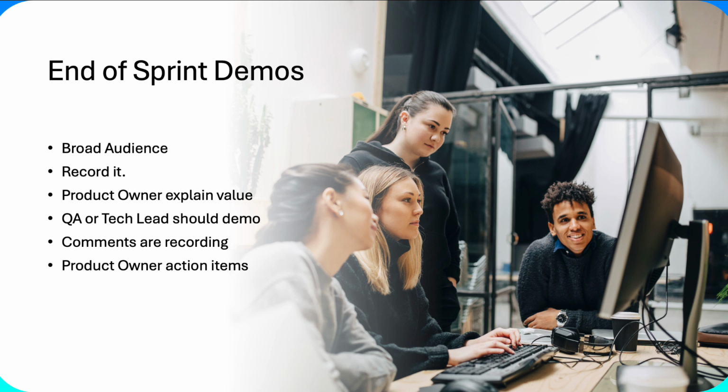The demo is best done by a QA person. And why would I say a QA person? A QA person's job is to test the product from a customer perspective. And that is very distinct from an engineering perspective. Engineers are focused on making it work. QA people are focused on making sure it doesn't break. So the QA person is the best person to give the demo.